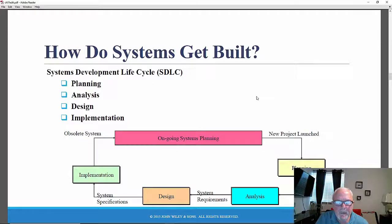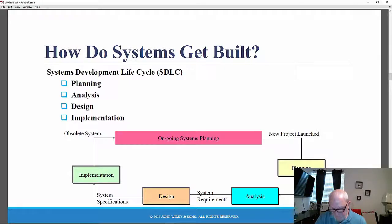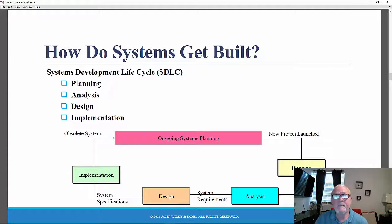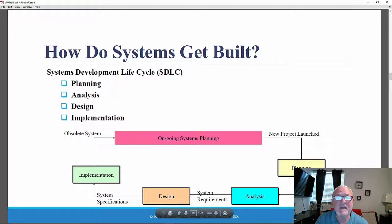So how does this work? The phases consist of steps, techniques, activities, and deliverables. Each phase has one or more formal deliverables that must be developed, submitted, and approved by the approval committee before you can proceed to the next phase.